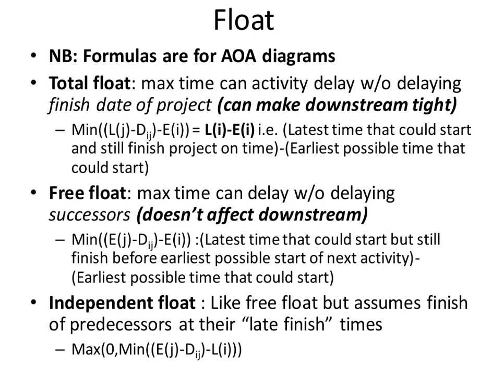Now, I should note that there are generalized notions of float, and we're going to have to finish with this. What we've been talking about is total float. There are more refined notions of free float and independent float. One of the issues here that's of big practical concern in some projects is that when we talk about float as the leeway you have, the give that you have, the slack time that you have, it's ignoring something very important in some projects, which is if you are working, say, on task 5 and someone else is working on task 6 here.